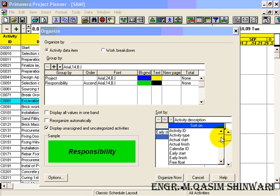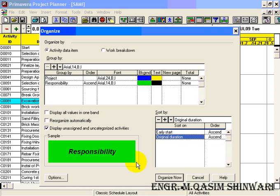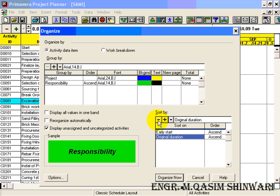Like, I will choose for example in this case as original duration. So first it will sort according to the early start and after that it will sort according to the original duration. In this case I don't need so, so I am going to delete the original duration, but you can do this.